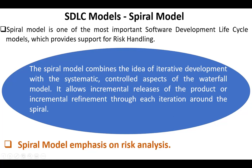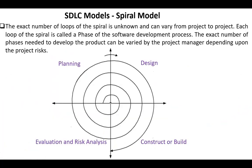The spiral model emphasizes risk analysis. The exact number of loops of the spiral is unknown and can vary from project to project. Each loop of the spiral is called a phase of the software development process. The exact number of phases needed to develop the product can be varied by the project manager depending upon the project risks.